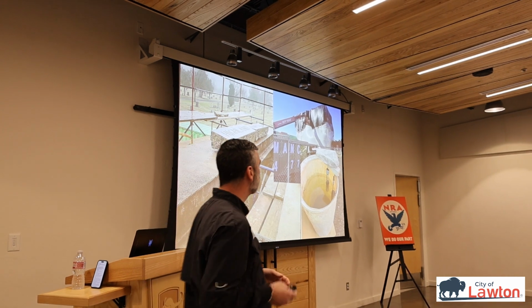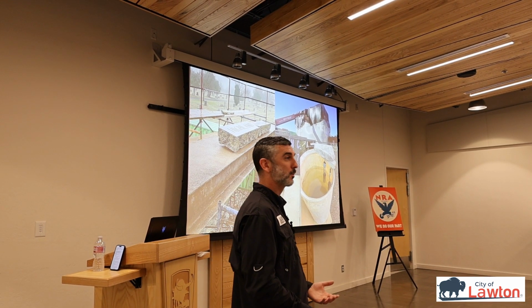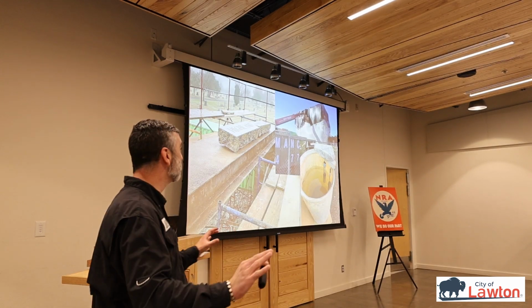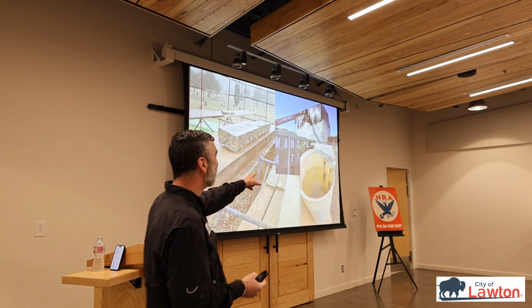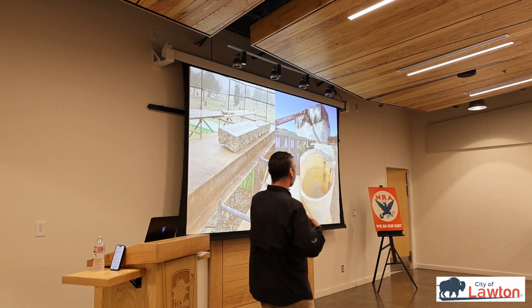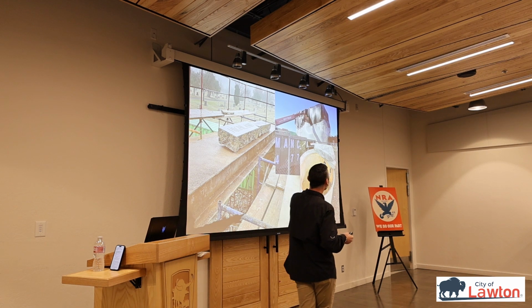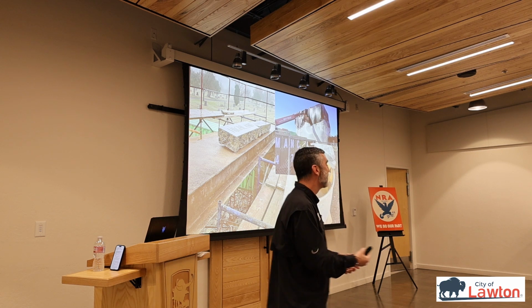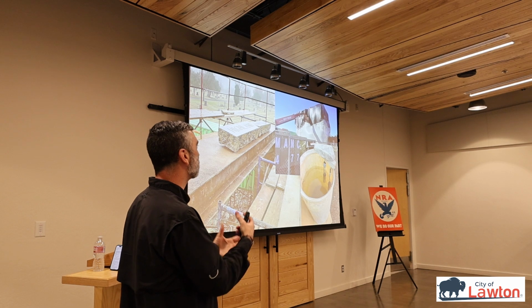So we called that same architectural conservator and said, it's freezing outside. How do we do historic masonry without breaking any of your rules? How do we break the rules without causing any long-term implications? And they walked through some of those. I'm from Western Oklahoma, my family grew up on a farm, and I hate being told no for an answer. So we used cattle trough heaters, heating the water up so that it wasn't cold water being used, which made the mortar dry appropriately.